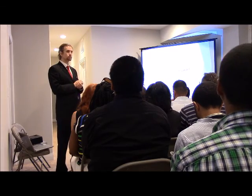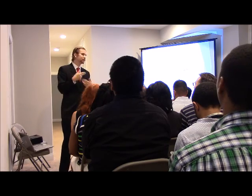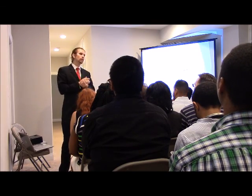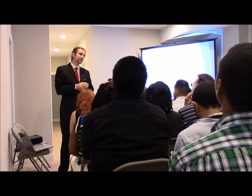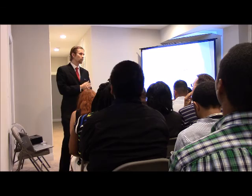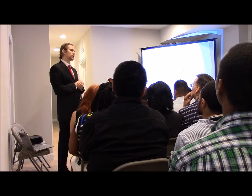What if you don't have the date and you're behind? You can go on the City of Chicago's website and just update the dates. How much time do you have to make the change? You can make the change at any time. It's just whether they're going to have the date that you want. If you do it in enough time ahead of schedule, it's not going to be a problem. But if I need to have an HVAC inspection tomorrow, good luck. That's not going to happen.